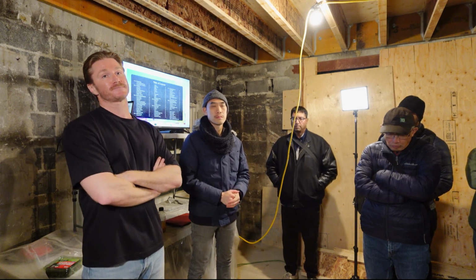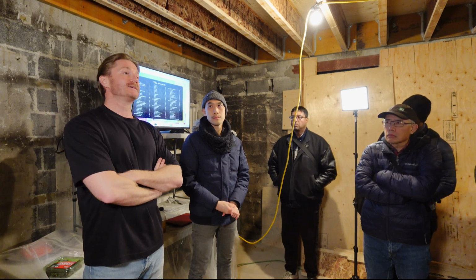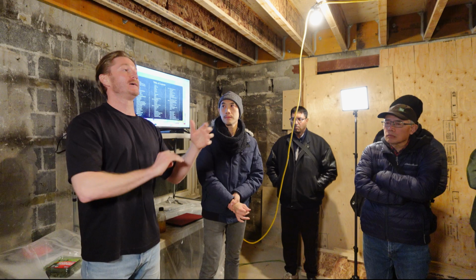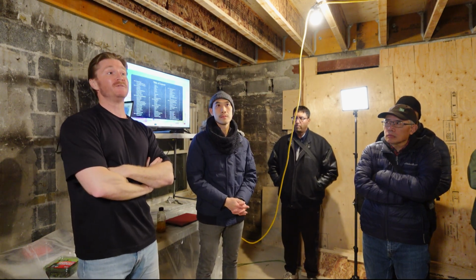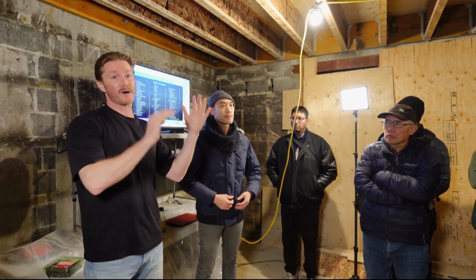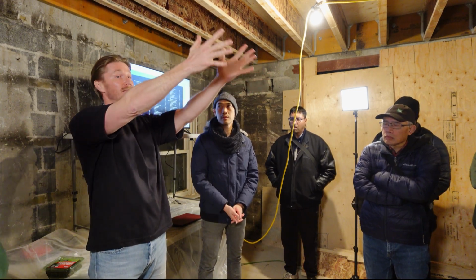Yeah, but I guess from what you're looking to employ, from a conservation perspective, what have you changed specifically there? Yeah. So again, the question is how have I changed my energy conservation measures to account for my necessity to minimize the cost? Wall assemblies. When you guys start building, this is going to be the most expensive energy measure you have. Historically, we built with an R38 wall system, non-combustible walls, which are super expensive. We've now been able to minimize it down to an R21, R23. If that's too technical for people, it just means my walls are smaller and less expensive.